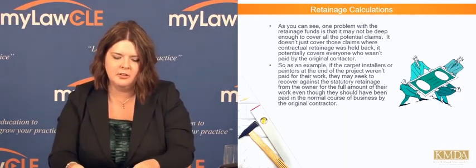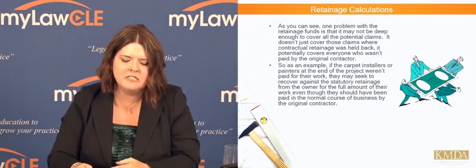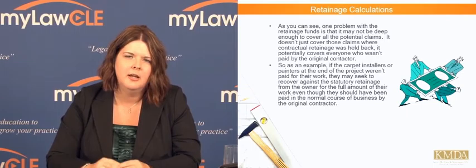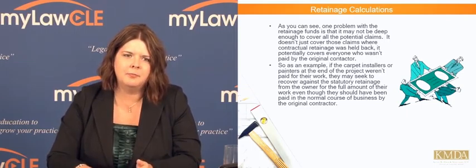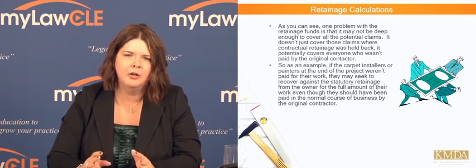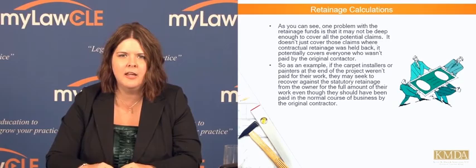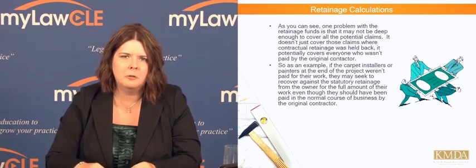Do not wait until the end of the deadline. The best rule of thumb is to file it immediately upon the client's substantial completion. What I mean by that is that a lot of times you can wait 30 days from substantial completion, and I don't suggest that you wait that long. There are so many variables about when substantial completion is and when the last deadline is to file things. And I generally don't want to get into a spitting match with someone as to when that deadline is.